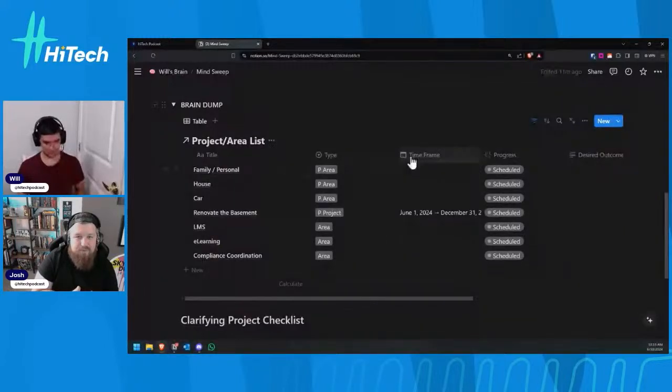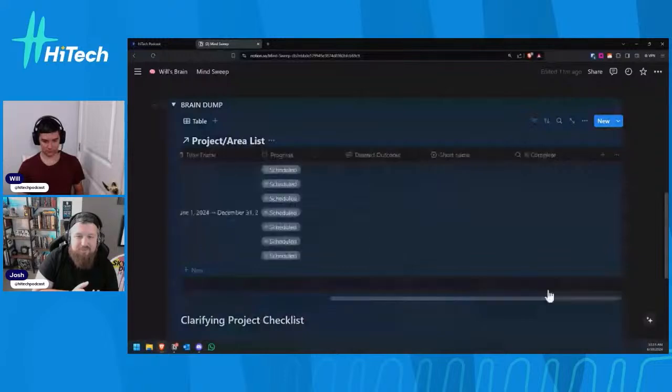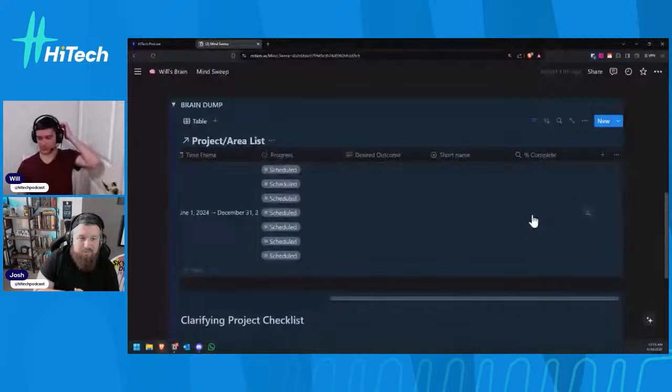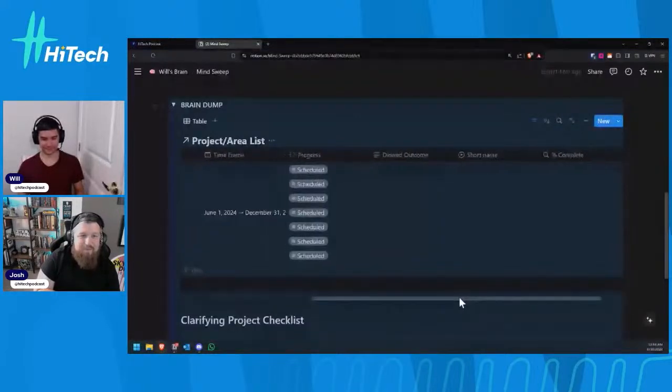Possibly when I did mine, I did put in some information in desired outcome, but for this video, we don't need to do that. So if you want to scroll sideways here for a second, let's make sure there's nothing else we need to fill out. Desired outcome is just your own thing. That's just for your own help. We'll put in short name later, renovated basement. Yeah, right. Percent complete is a formula field set up to look at the amount of tasks you have versus the amount of tasks that are set to done. It's just a system that'll tell you what percent complete you are with the project. I go back and forth on leveraging that field because sometimes it's like, is it really that done? Because I add tasks later, but whatever. We'll deal with that later.